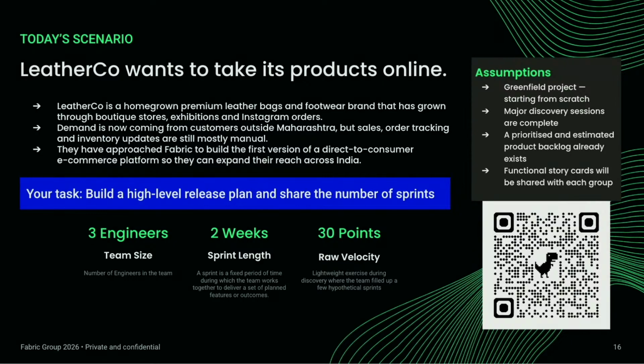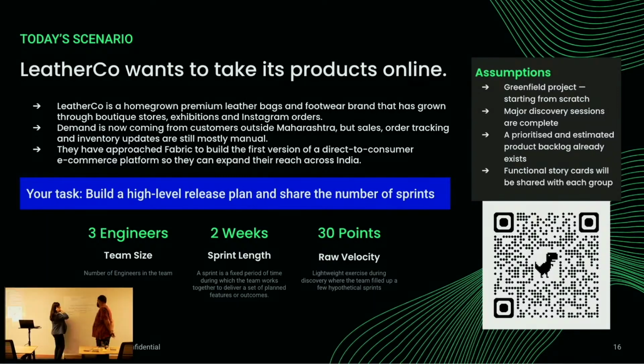All right, I'm just going through your set of stickies here and how you all have planned for it. Sprint 1: building the product backlog, search and filter, shopping cart, which is a total of 30 story points. And then in sprint 2, inventory management, because without an inventory management tool, you will not really know the status of the stock, and checkout. So I think the sequence is looking pretty good here. Then there's payments, order tracking, order history, which is exactly 30 points. And then the last sprint will have account management, analytics reporting.